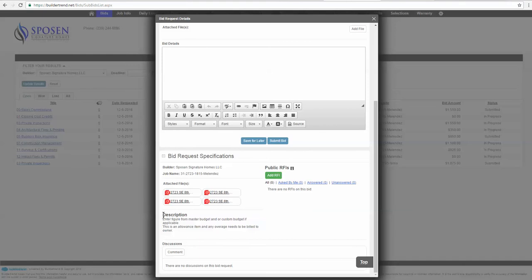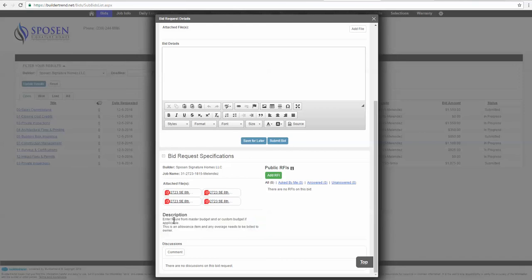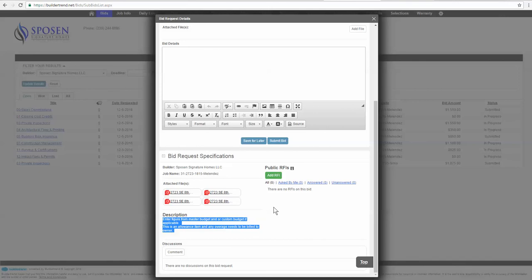Below that's going to be your description. The description is basically going to be a quick scope of work. This one is just for our accounting department, so it's a very easy, quick scope of work—just us putting in the cost of the permits and impact fees. If you're a painter, it's going to tell you how many coats, if you're doing interior, exterior. If you're a concrete person, it's going to tell you all about if it's a lintel beam or if it's a tie beam. It's basically going to be your scope of work for your particular trade outlined in the description there. So you can take the scope of what we want you to do, put it against the documents that we have attached, and then basically give us your bid number.